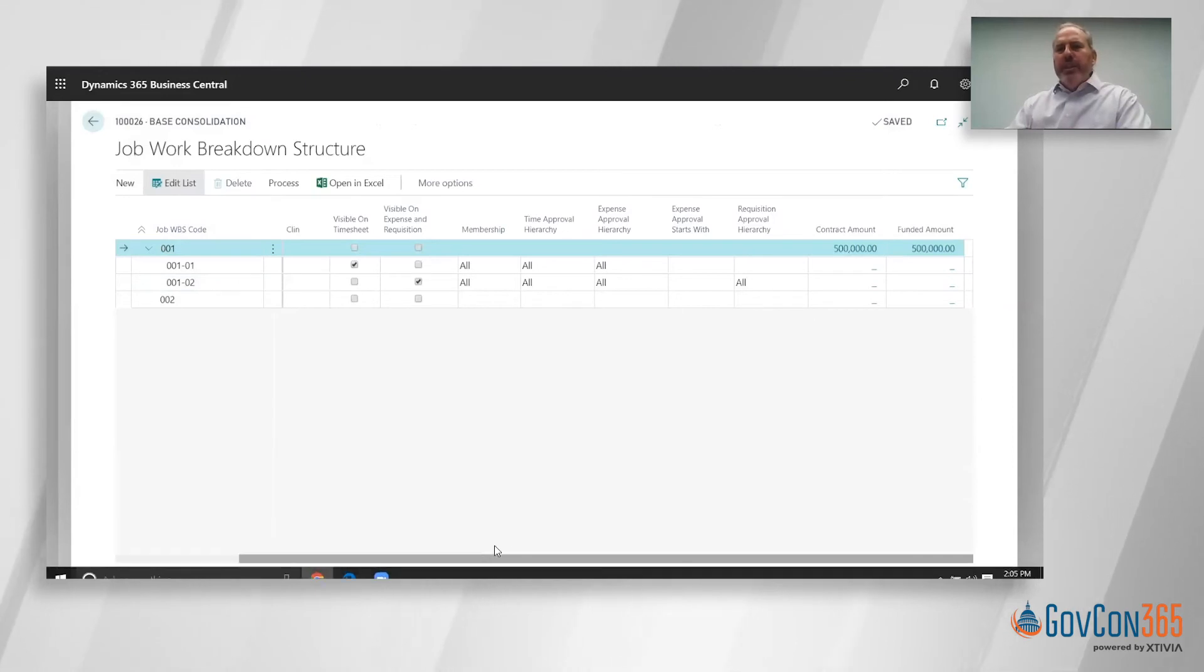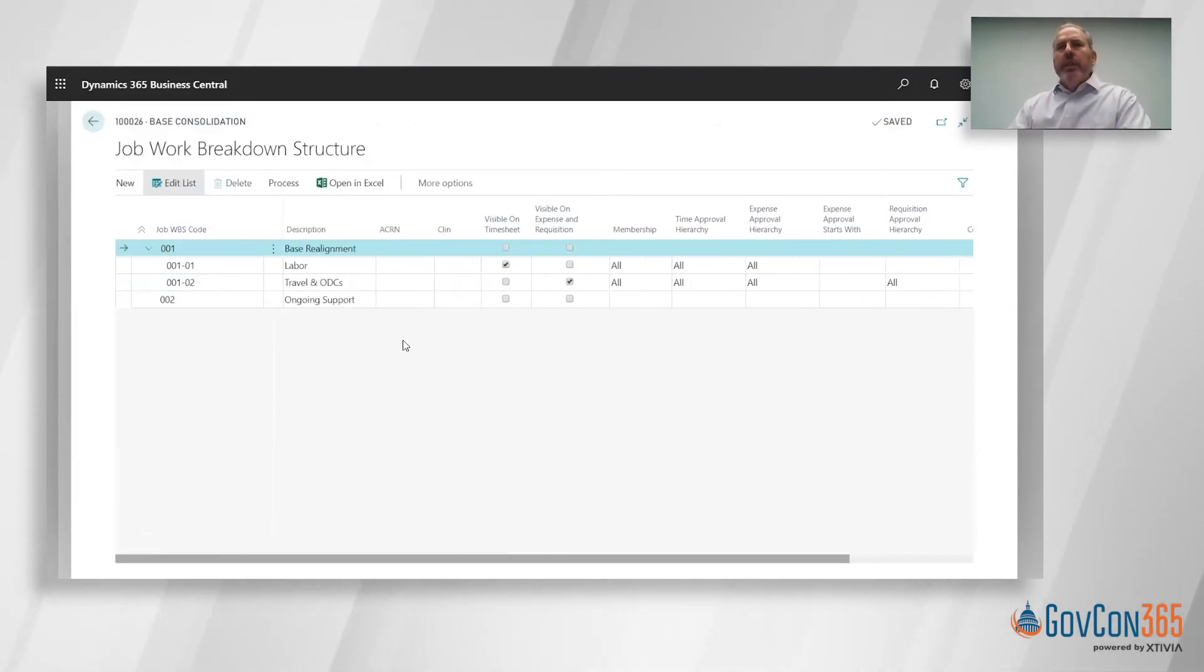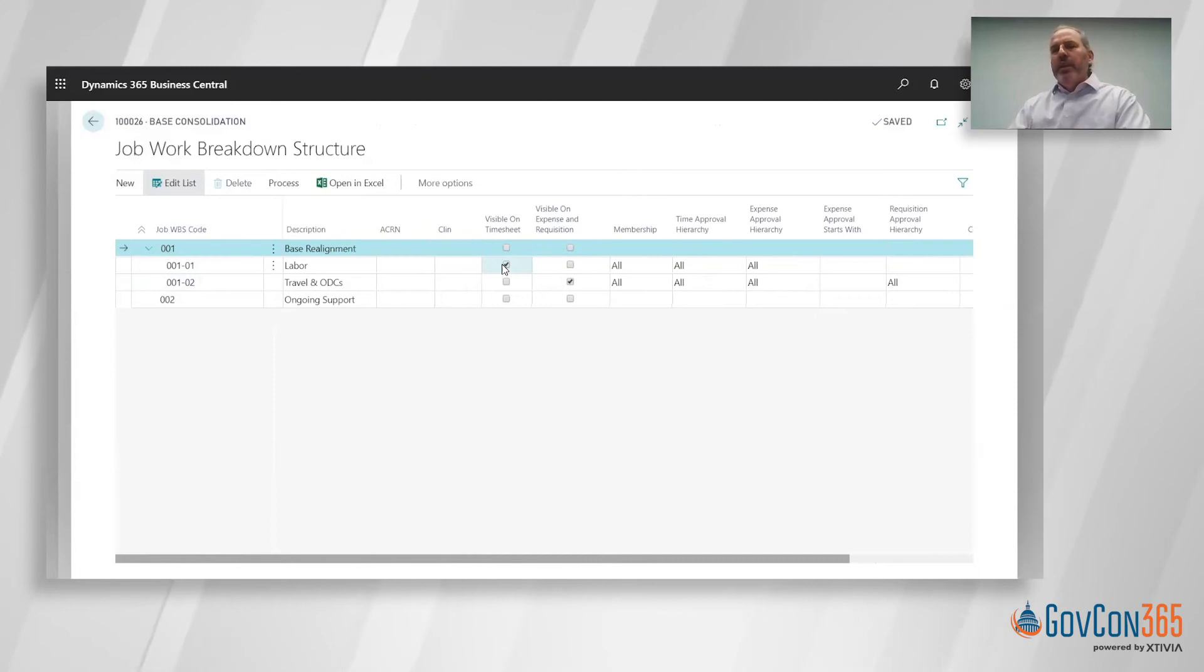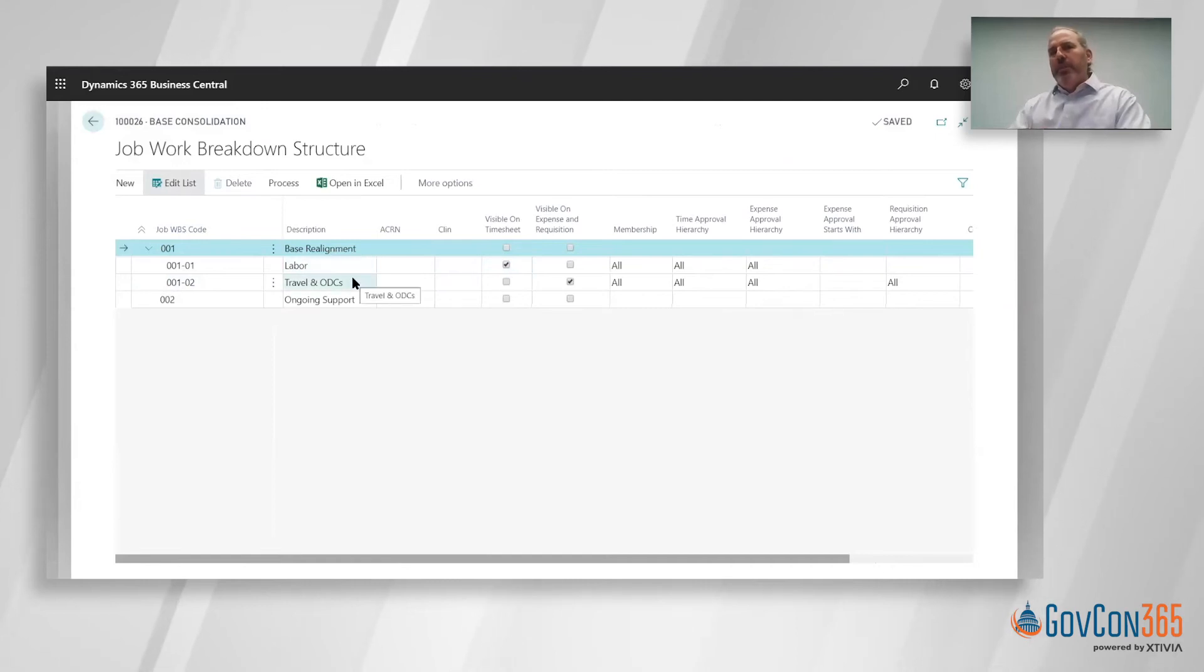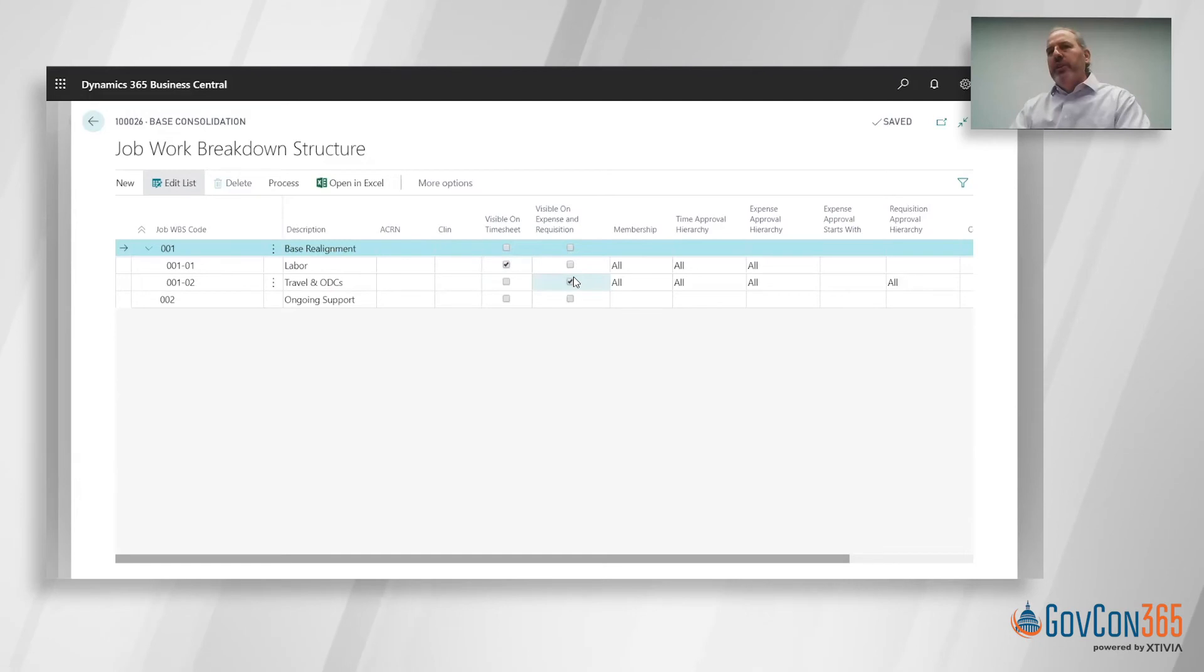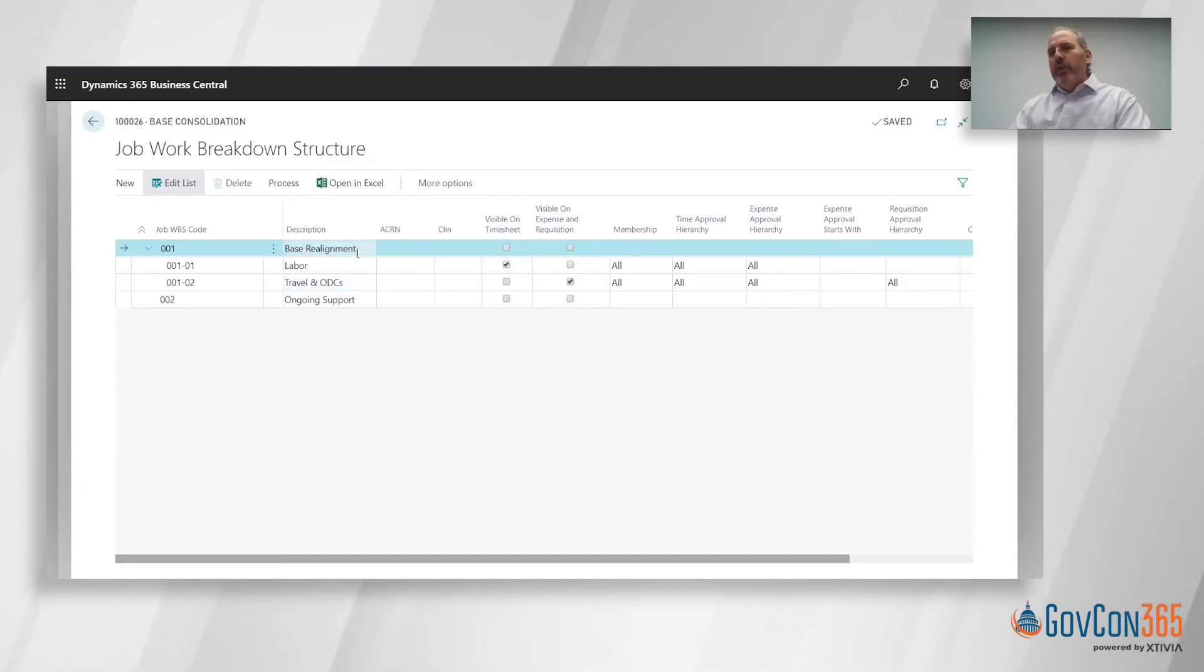Other things within the WBS is you can also attach Akron's or CLIN's from a funding perspective. In terms of visibility, we have the ability to define what charge codes can be visible. You're charging at the lowest level of the WBS and you can see that this charge code for labor is visible on a timesheet, where this one that says travel and ODCs is only visible for an expense report.